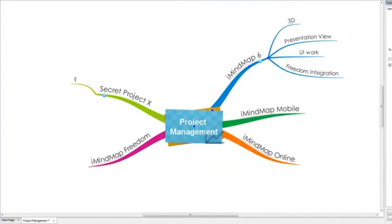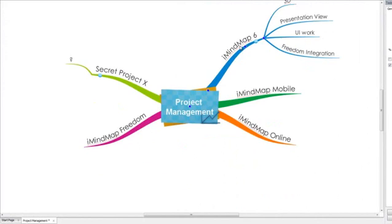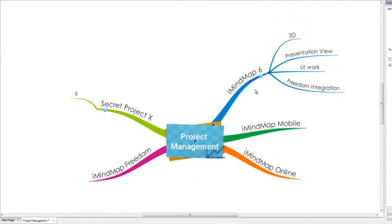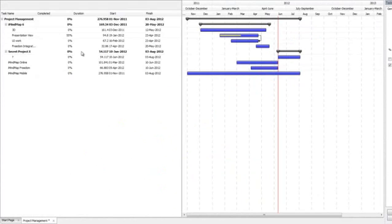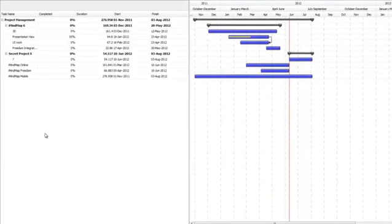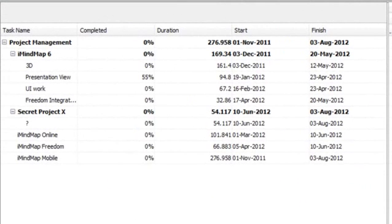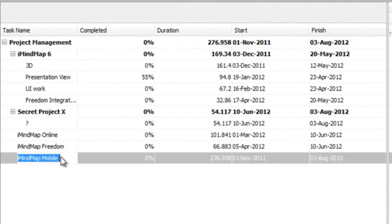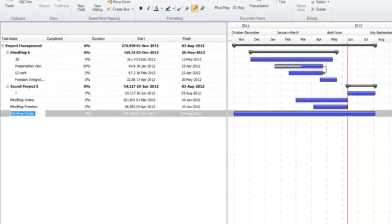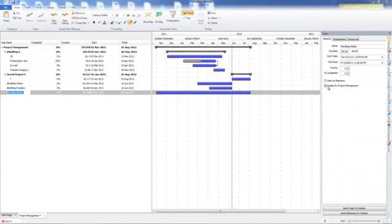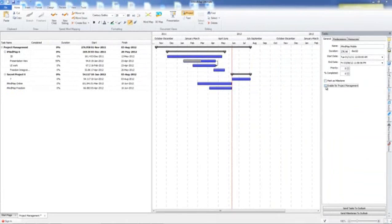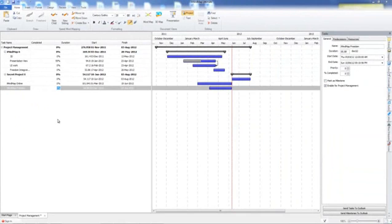You'll notice that all of the branches that you have in your map are reflected as tasks when you first go into project view. You can disable these from being shown in this view by unchecking the enable for project management box and as you see, that's no longer shown in this view.